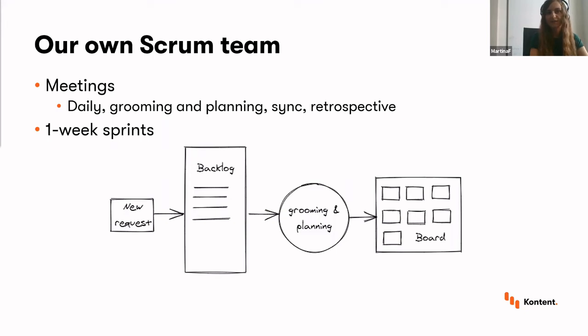On top of that, we've started planning our own sprints. First, we adapted to the development model where each sprint is 2 weeks long. It made sense at the time since we were still working on a lot of development requests and docs were released at the same time as new product features. But after some trial and error, we ended up with just 1 week sprints, which we're still doing now. This helped us boost our productivity as well as make our planning more flexible, basically.